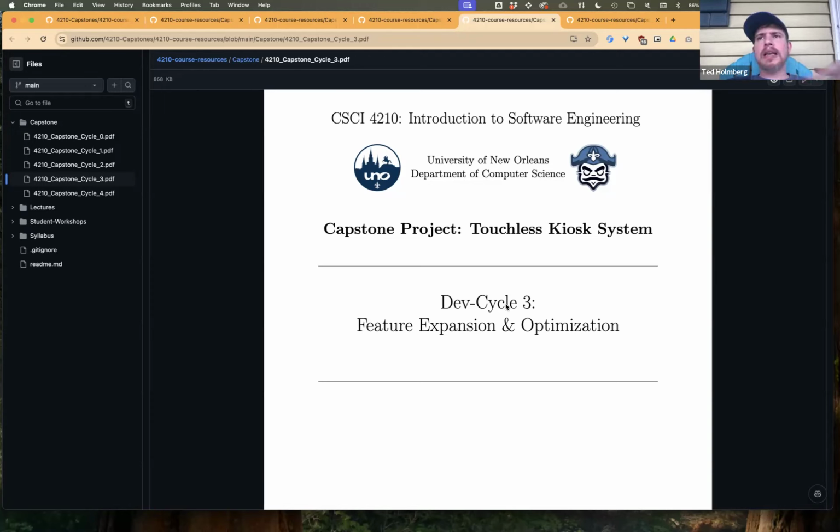And then we can just keep rolling in our features from high priority to medium priority to low priority until we hit a maximum number of features that we're comfortable with, or we hit the deadline by which we need to deploy. But at any time, as we're doing this feature integration and expansion, we always result in a deployable build. That should be critical: as we identify a feature and append it into the system, we can then launch the system, deploy it, and it's fully inclusive, works, and does not break down, and it is now a new, more improved version of what we had before.